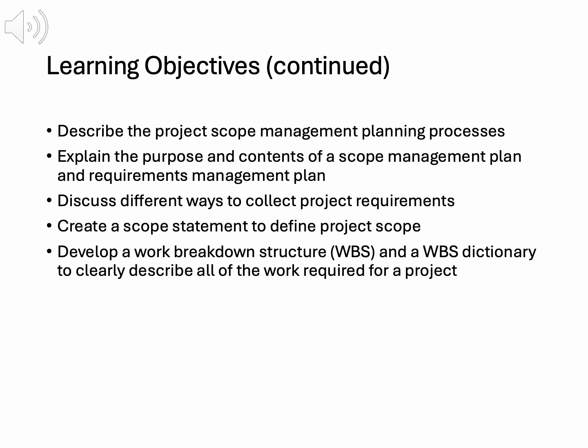We'll also discuss methods to collect project requirements, such as surveys, interviews, or workshops. For example, in the Just-in-Time Training project, a survey identifies training needs, ensuring courses meet employee expectations. You'll learn how to gather accurate, actionable requirements to drive project success.